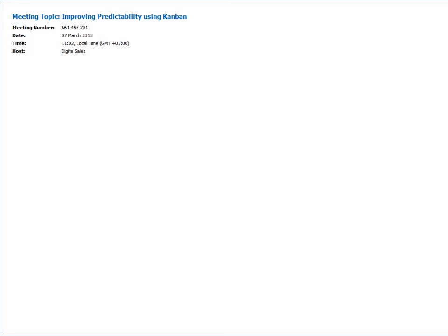So you'll be able to pick up the team profile, the work profile, the min-max effort estimates for a coding lane or for a testing lane. So you'll be able to build that as an initial data set for the simulation engine, and then be able to change it so that you can do your what ifs. I hope I answered those two questions.